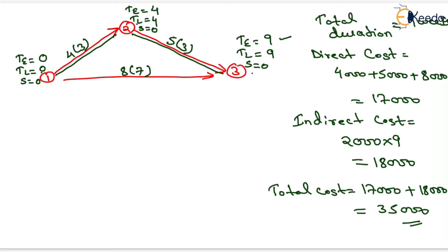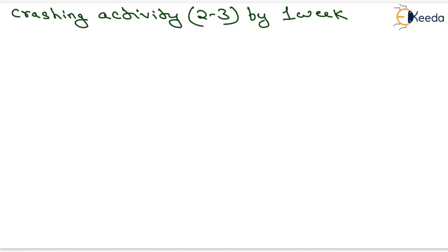The cost slope of activity 2–3 is the minimum at 1000 rupees. We could crash activity 2–3 by up to 2 weeks since its crashing potential is 5 minus 3 equals 2. However, crashing it by 2 weeks would change the critical path from 1–2–3 to 1–3, which we want to avoid. Therefore, we will crash activity 2–3 by only 1 week.